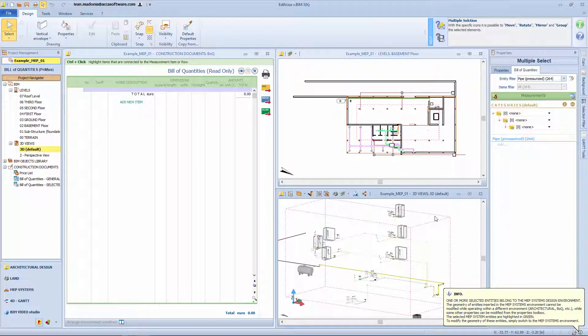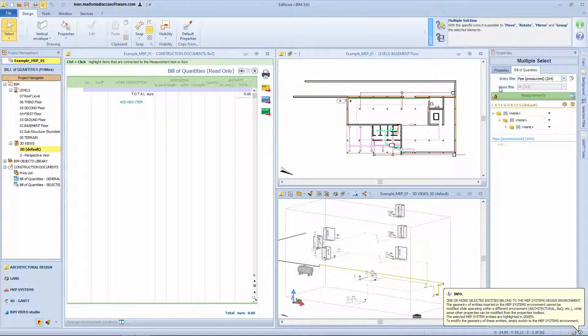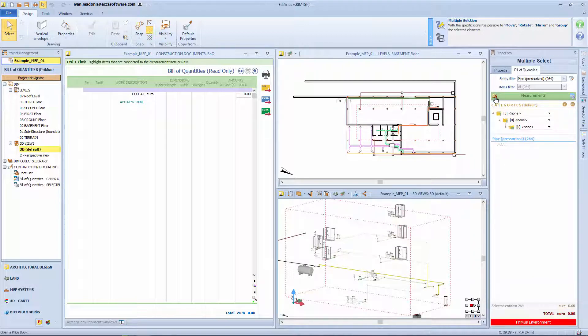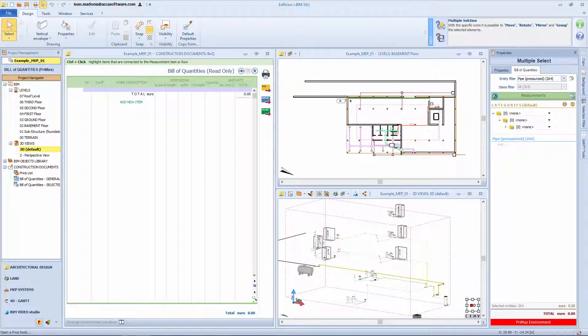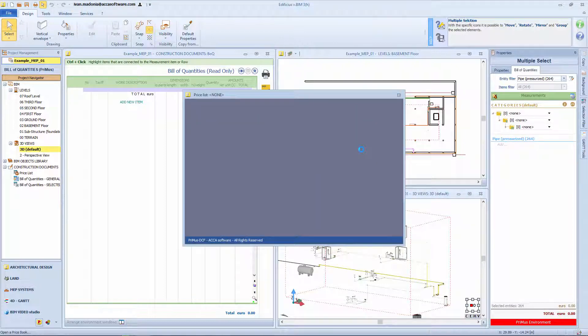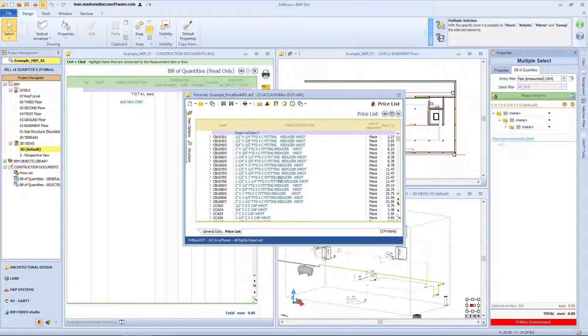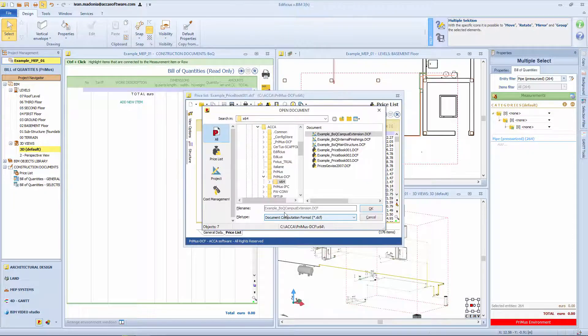In the Properties Toolbox there is the Estimating section where you'll be able to see the accounted for objects. To proceed, simply select the single entity or a group of objects and then proceed to selecting a price list item.